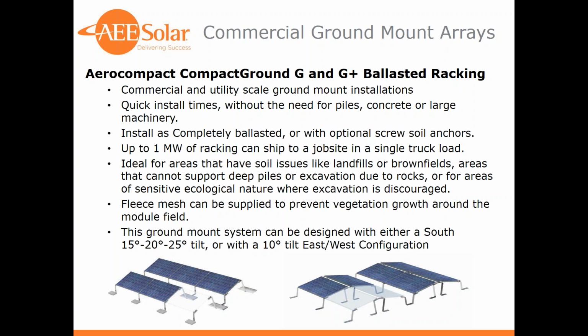It has the longer legs, gets a little bit higher off the ground, but we're doing quite a few of these, especially Arizona, Southern California, Texas. Quite a few of these we are offering for both residential and commercial arrays. So up to a megawatt of this racking can be shipped to a job site in a single truck roll. You don't have to buy the pipe. You don't have to ship large piers, and it installs very quickly.